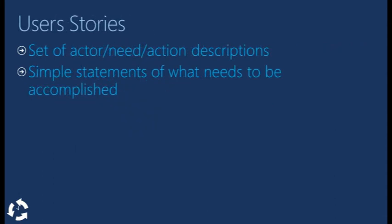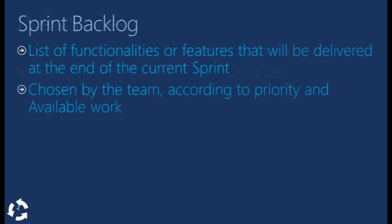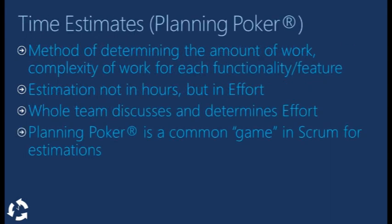User stories are simple ways of creating requirements based on an actor, a need and an action. The sprint backlog is a list of all the features that will be delivered in that sprint, taken from the product backlog and picked by the development team. There is a lot to be said about time estimates as it deserves a video of its own. For now let's just make it clear that estimation efforts are determined by complexity and not by hours of work.